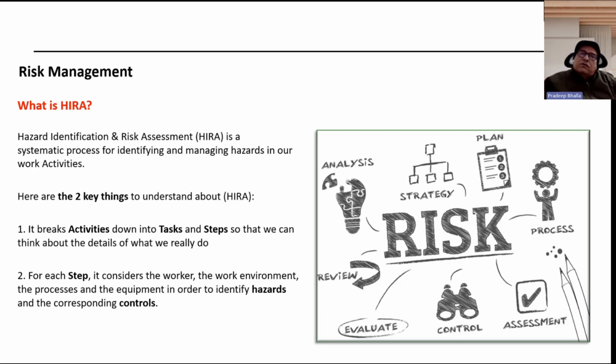It was to be fixed at a location where there was water on one side and a platform on the other side. So it was a huge challenge there, how to provide a proper ladder and how to safeguard the person, because it was an effluent treatment plant. If the person falls inside the water, he can be injured by any moving equipment inside the water treatment plant. So in order to save the person, we had to do a very thorough risk assessment.